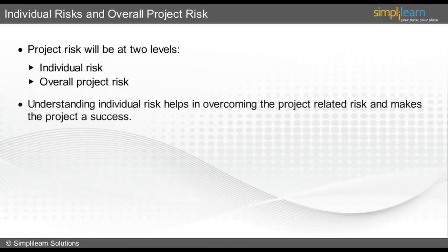Individual risks are specific events or conditions that might affect the project objectives. For example, the delay in arrival of equipment affects an individual activity and may delay the overall project schedule. Day-to-day project risk management focuses on these individual risks in order to enhance the prospects of a successful project outcome.